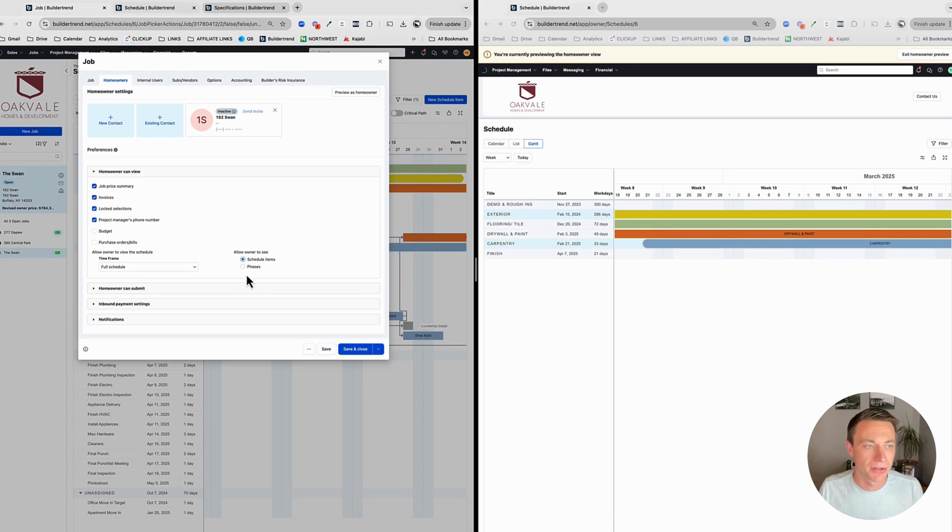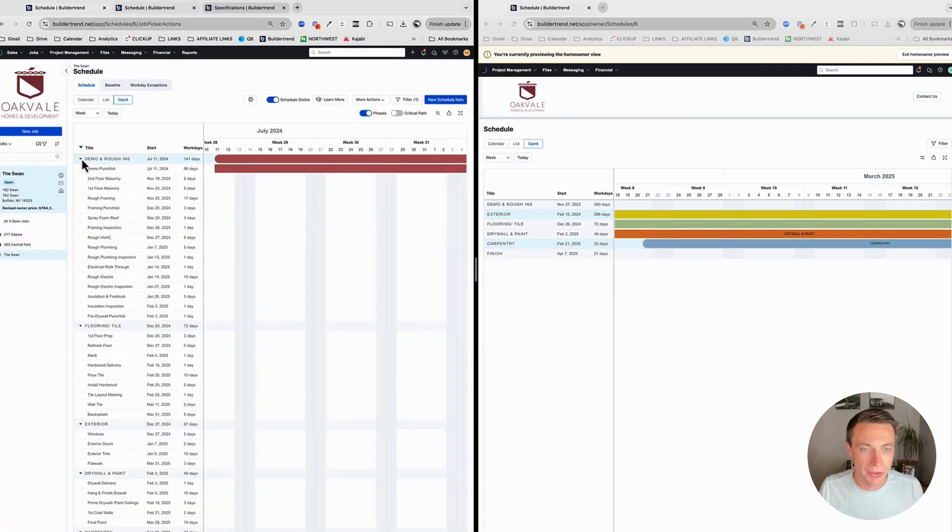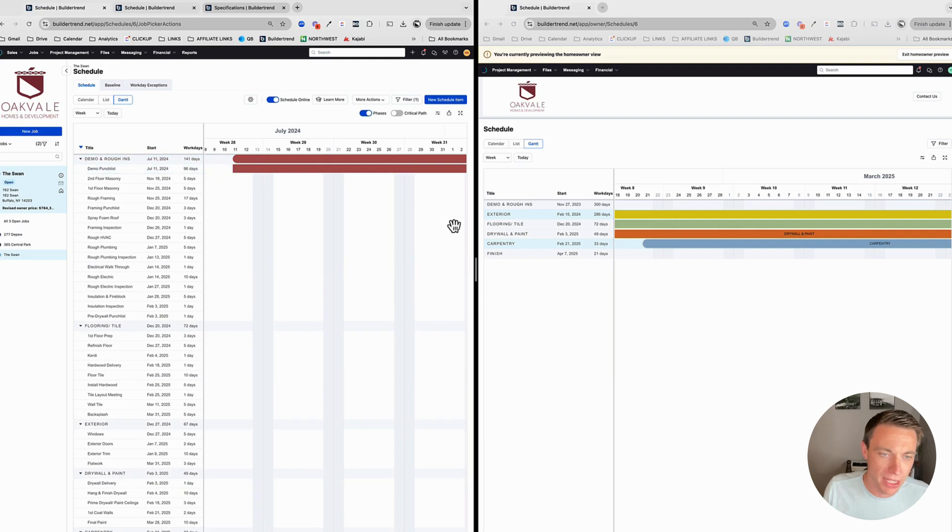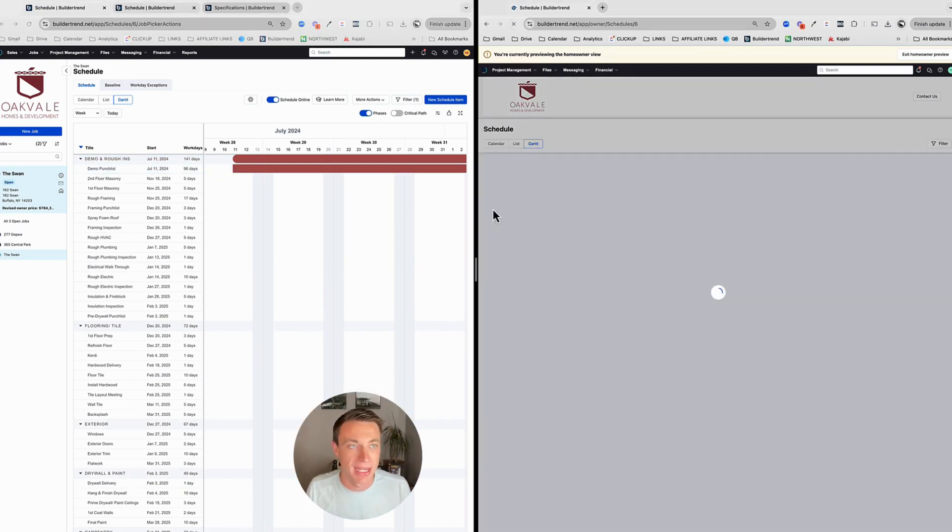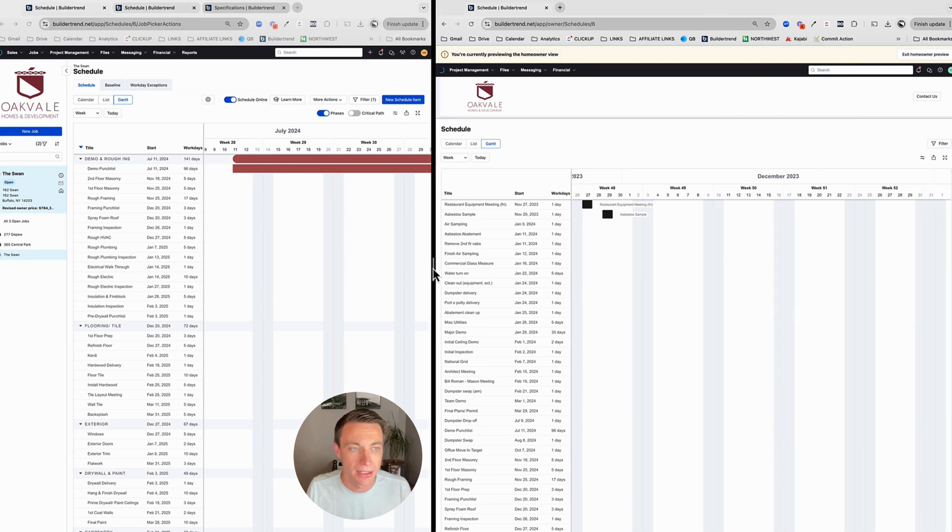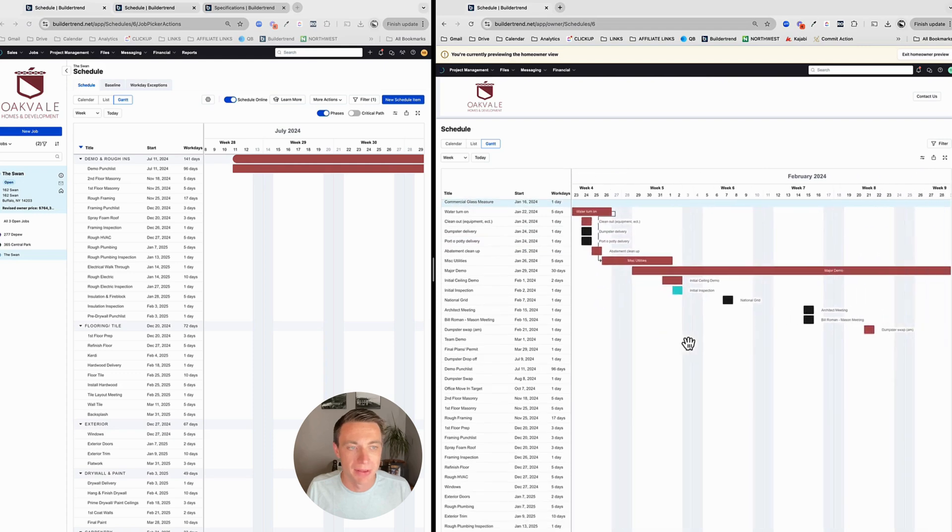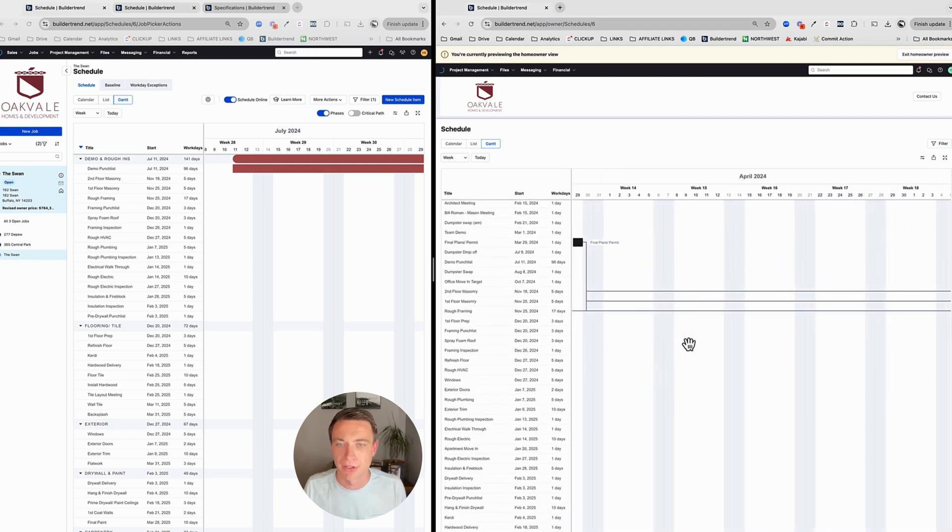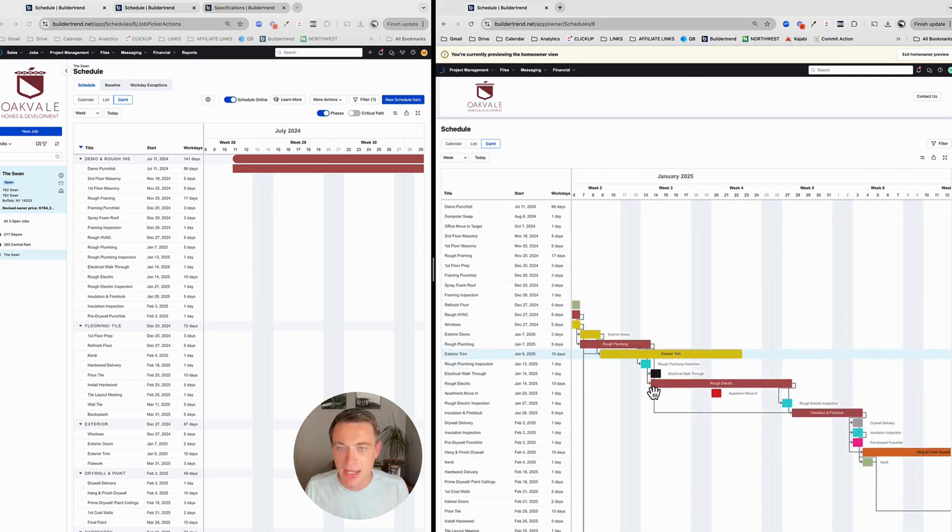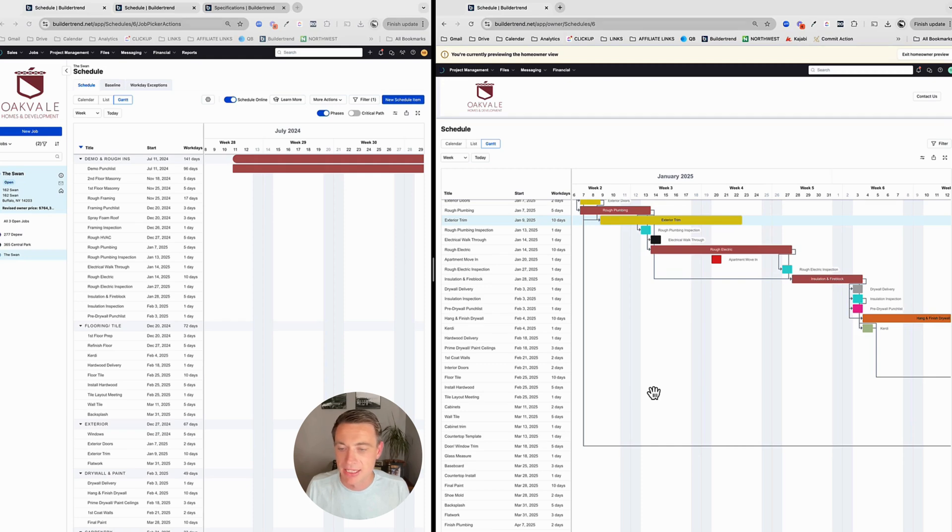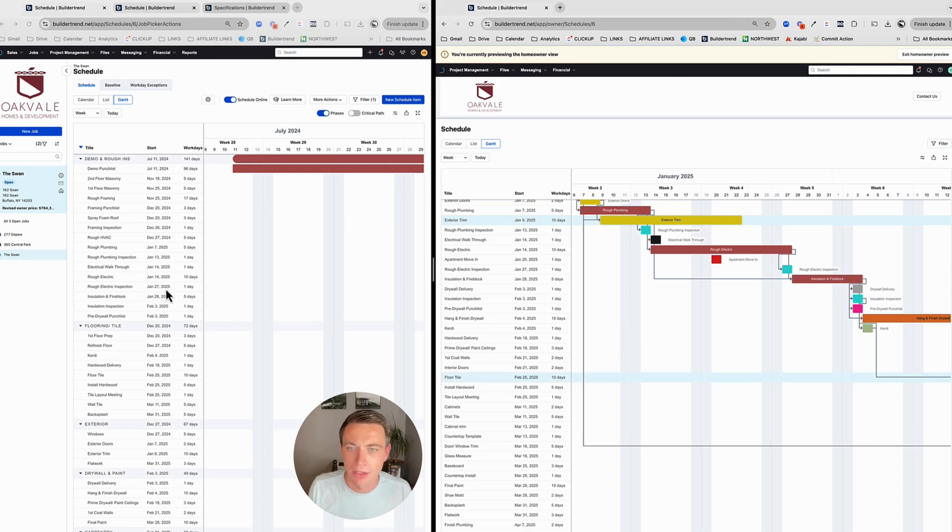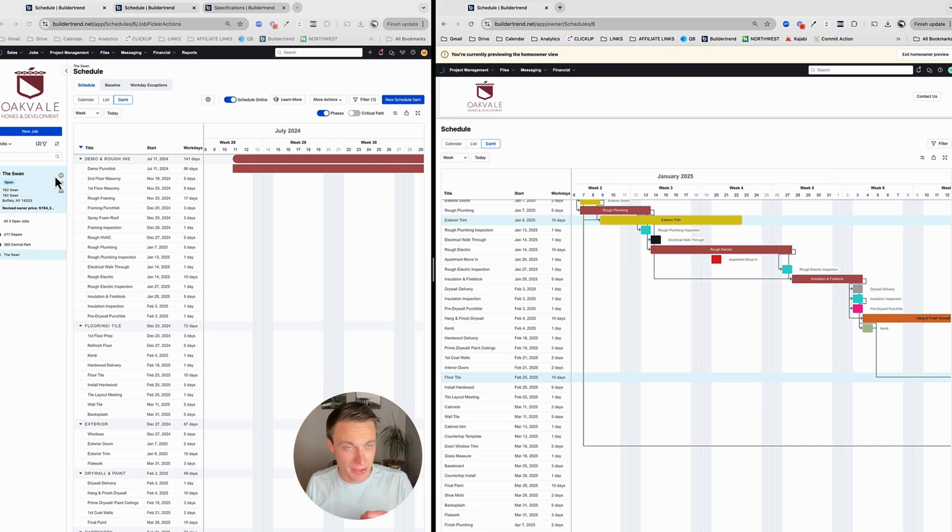So what we should do is we should give our customer access to the full schedule. And that's what I've been doing. So if I go into my project information here and go into the homeowner, go to homeowner can view. And right here, full schedule, yes. But I also want them to see schedule items, not just phases. Now, I wish they could see the phases and the schedule items like we can see here. And they can click and collapse it. But that is currently not possible. But if I refresh my homeowner screen over here, you're going to see that they're able to see things a little bit more detail. So they can see that my drywall and paint is not going to take that long. Now, again, what they can't see yet is the roll-up version of the schedule. That's kind of a bummer.